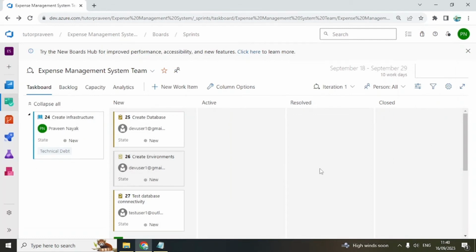Now initially the team will not have any idea how much time it will take. So it is always better to assign more points, so that you know that it could be very complex, there are a lot of unknowns, risks. Okay, so assign more points initially. And gradually when you move forward, those points will come down, because the team will become experts.